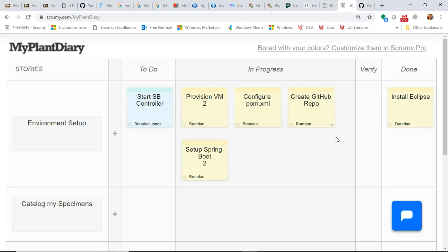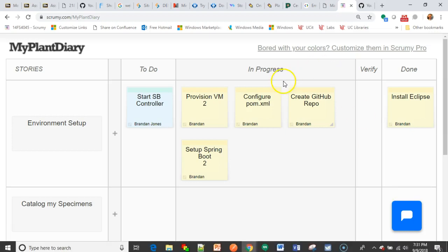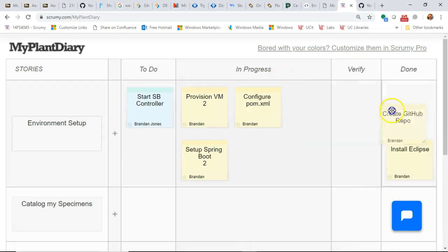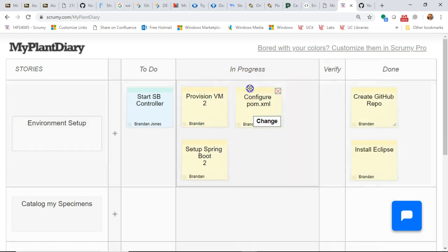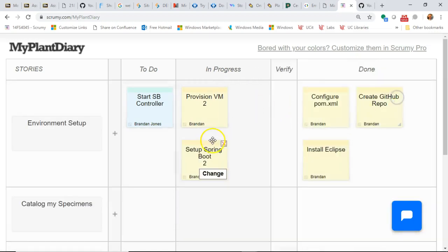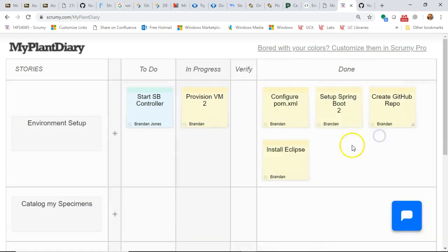So I worked on a project one time where there were 19 things in progress. The Scrum Master came in, counted 19 items, and asked how many team members there were. We said 4. And he said, well, then there should be only 4 things in progress, not 19, which makes a lot of sense. So anyway, keep an eye on that. I'll ask the Scrum Master of your group to make sure that everybody has 1 thing in progress at all times, maybe 2, but you really shouldn't have like 5 things. So the Scrum Master should watch that.